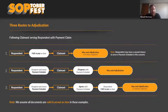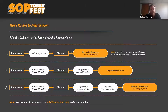The third pathway: the respondent disagrees, serves a payment schedule, the claimant agrees with the payment schedule amount, but the respondent fails to pay on time — then you can issue a section 17(2) notice or go down the path toward summary judgment. We're making assumptions that all the documents are valid and served on time in these examples. We can talk about jurisdictional issues later.